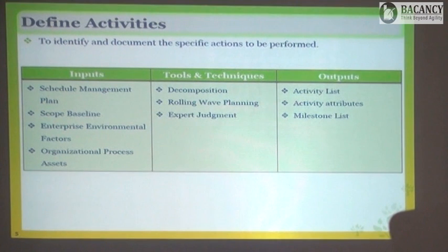Your activity remains the same: buy tomato, but the way you are going to do that activity, that specific information is called your activity attribute. So the activity is buy tomato, and the attribute of this activity is what? Buy green tomatoes only. The tomatoes should not be soft. They should be fresh and hard. Isn't it? That is your activity attribute.